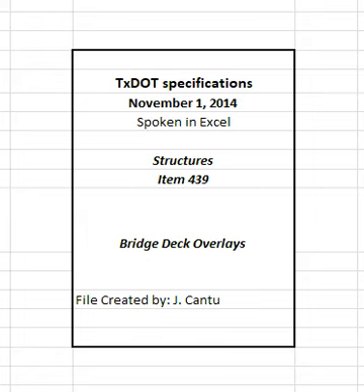Place concrete only when the air or deck temperature is 40 degrees Fahrenheit or above and the concrete temperature is between 50 degrees Fahrenheit and 85 degrees Fahrenheit. Do not cart concrete batches over the completed overlay until the overlay concrete has attained a 3000 psi compressive or 425 psi flexural strength. If carts are used, provide timber planking of at least 3/4 inches thickness for the remainder of the curing period. Provide carts equipped with pneumatic tires.